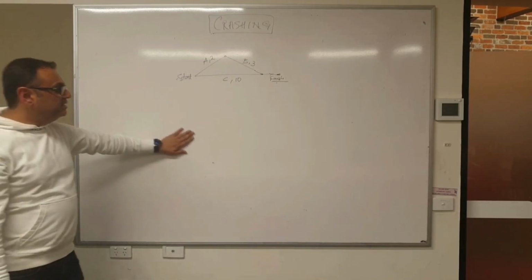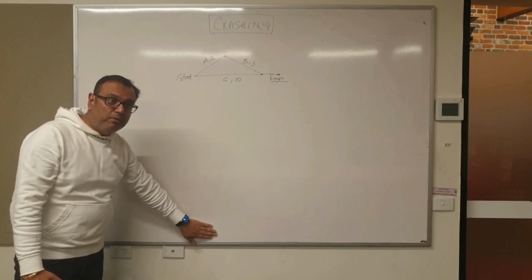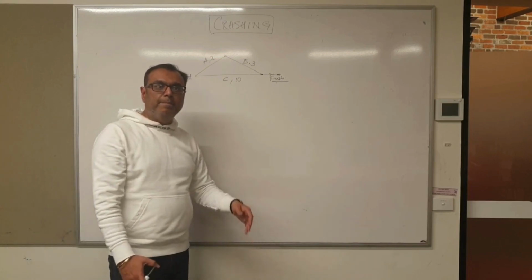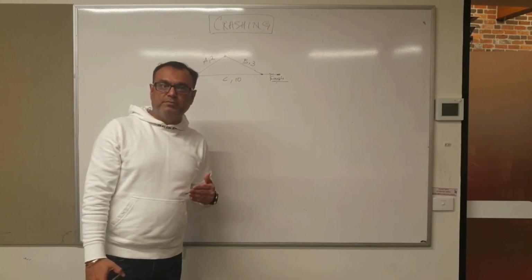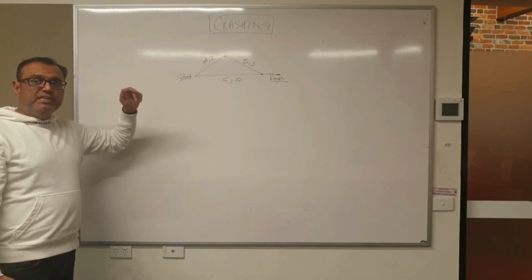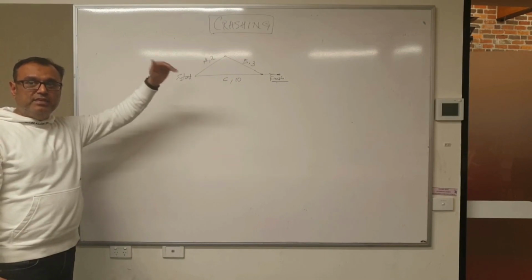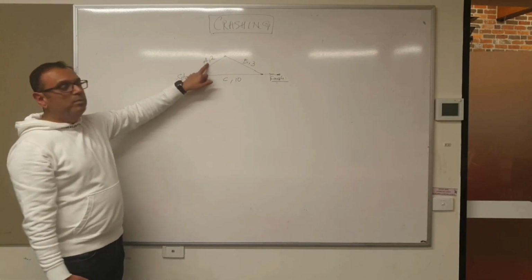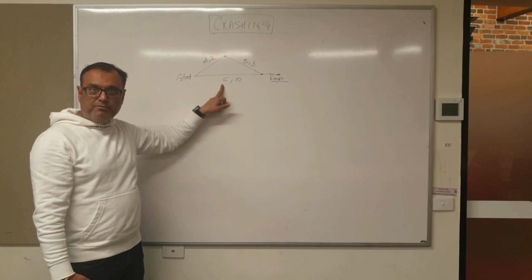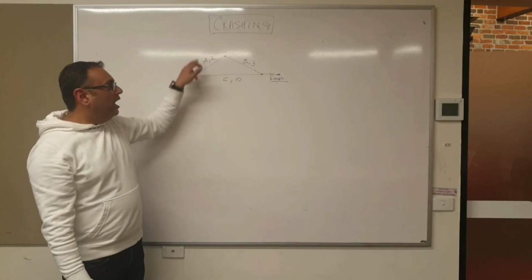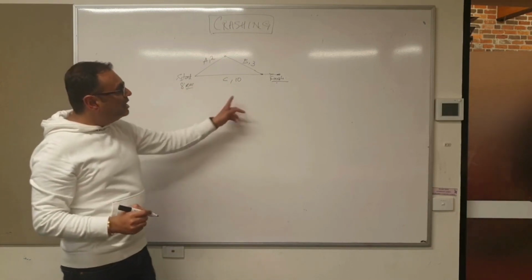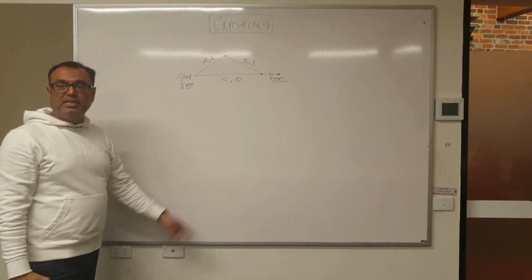The other way of finding the critical path is, and again, if you don't remember, the critical path is the minimum time that is required to finish your project. You remember we took the example of eating breakfast, downloading an email, reading the email last week, right? If it takes 2 minutes to download an email, 3 minutes to read an email, and 10 minutes to eat breakfast, and this guy is starting at 8 a.m., what is the minimum time this guy will be out of his house to catch a bus? It is 8:10